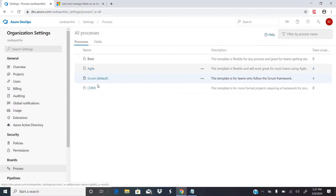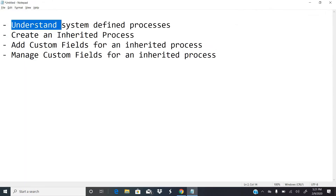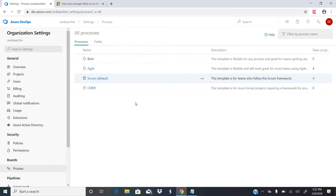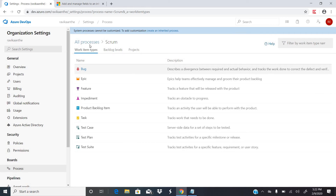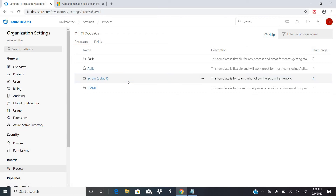Now we understand what the system-defined processes are. How do we create an inherited process? An inherited process means Azure has provided us system-defined processes, but in your organization those system-defined processes might not be suitable. In that case you have to customize the system-defined process by creating an inherited process.